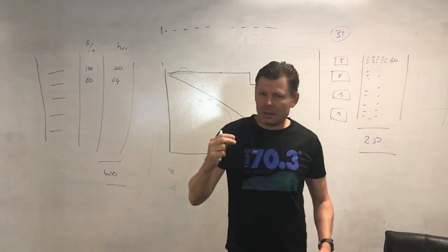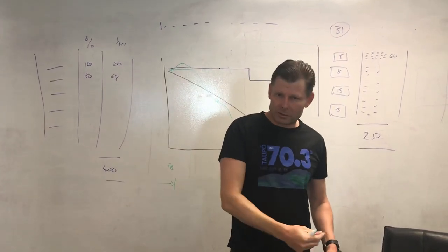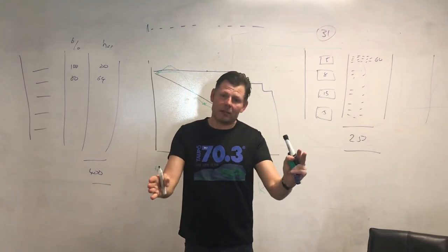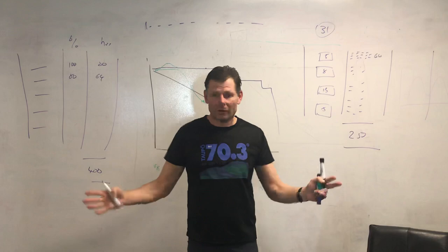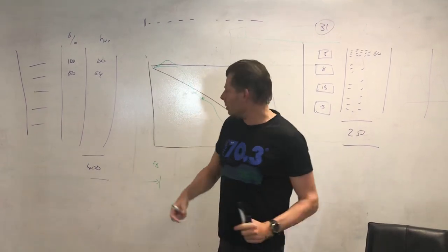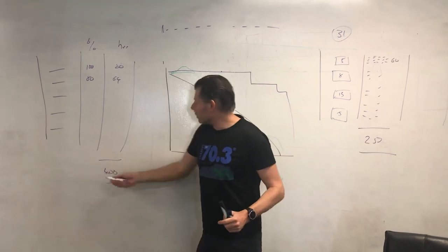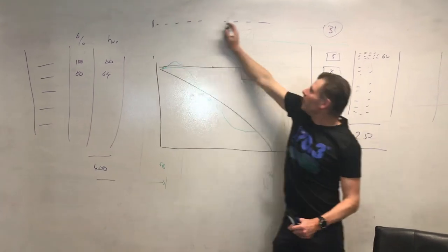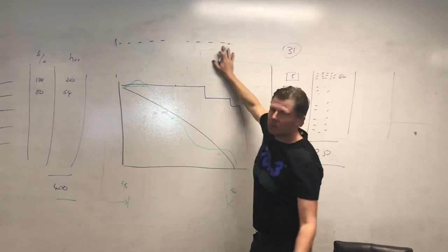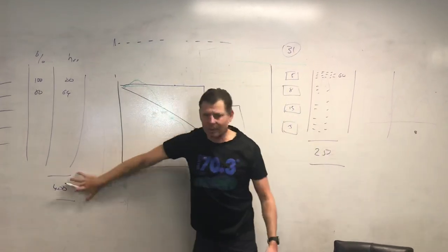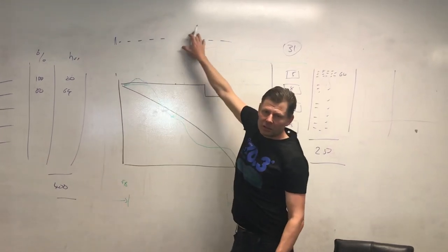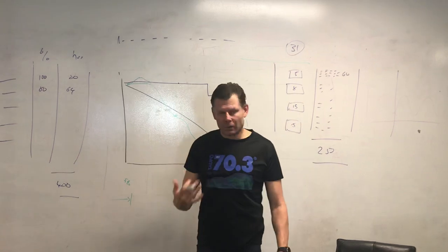Incidentally, I'm including in this the sprint planning, the sprint review and retrospective. So the sprint starts at the start of planning and finishes at the end of a retrospective. And we're going to include all of that. We include refinement, off project stuff, everything that the team does. So we have a theoretical maximum here, and that creates a ceiling up here that we know we can't reach. Obviously, everybody knows, we're not ever going to get to 400 hours for the team in 2 weeks, a team of five. But that just sets the expectation, and we want to simplify the way we look at this.